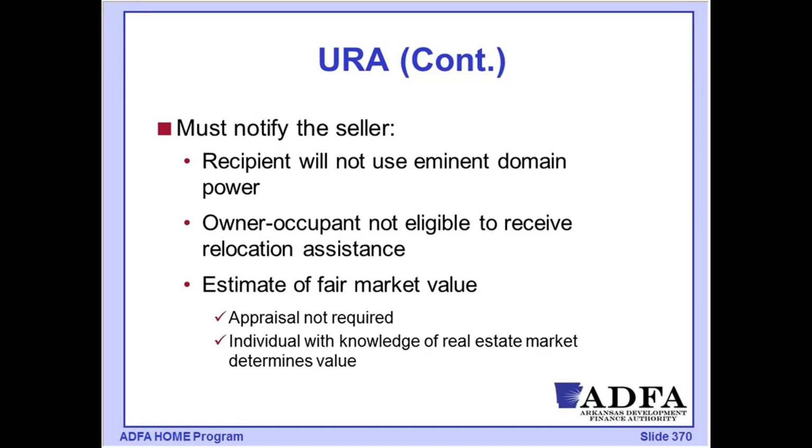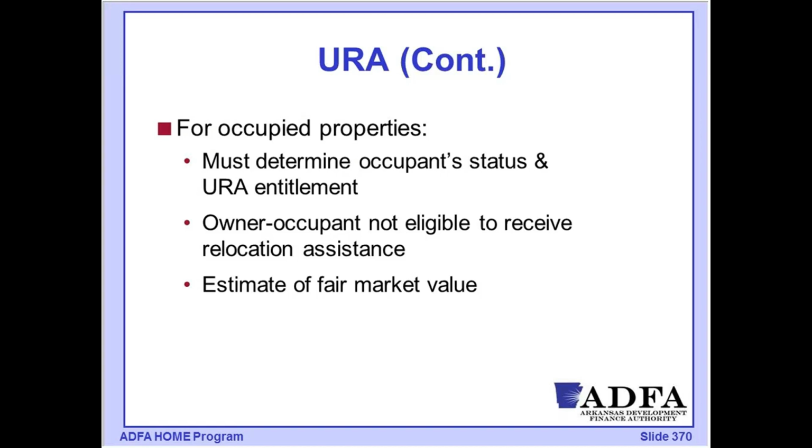So as part of that, we would either have an appraisal done. Generally, that's not going to be done. We're going to either use someone that's knowledgeable in the real estate market to determine a value. In some cases, these properties are already listed and they have listed what they believe the fair market value would be. If you, as the recipient on this, feel that that listing price is an appropriate representation of the real estate value for that property, that also could be utilized. So this voluntary acquisition notice must be done before that sales contract is executed.